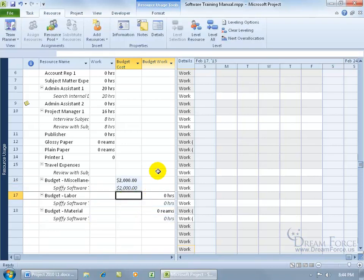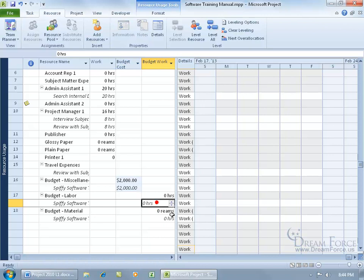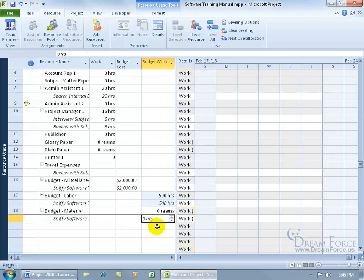In the budget work field, enter the total number of hours — let's say it's going to take a total of 500 man hours to complete the project — type it in and hit enter. Then for the budget material field, if it says 'hours,' just ignore it and type in the number of units, since every time you assign a material resource that counts as one unit. Let's say 10, then hit enter.